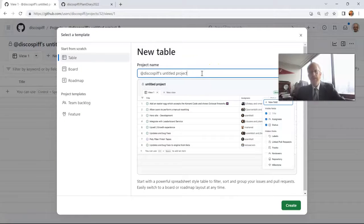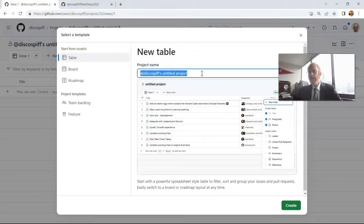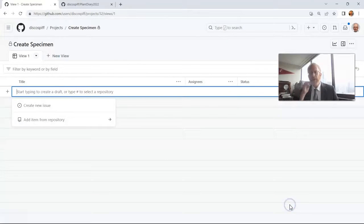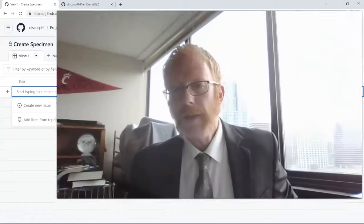This is nudging us to start with the table view — let's go ahead and do that. A project, as I said, tends to be a feature, so let's give it a name a user will understand, something like 'create specimen,' 'edit specimen,' or 'manage specimen.' These are functional words describing a feature we can add to our application. Just like we'd see in epics in other Scrum-based tools, the table view allows us to add more specific tasks. These tasks tend to be the technical tasks you'd discuss in a backlog refinement or sprint planning — you might give them story points or relative complexity — things like 'create database,' 'create API,' and so forth.